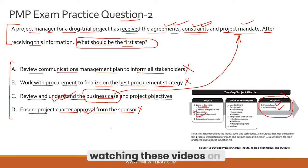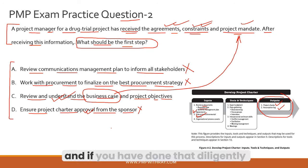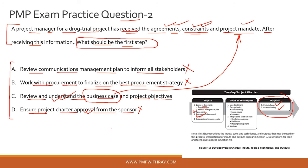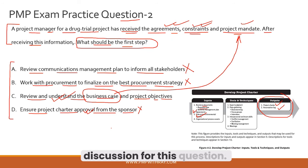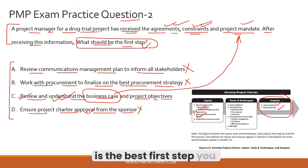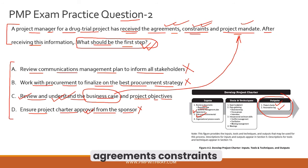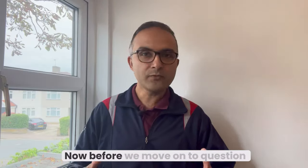Option D is basically jumping one step ahead. Be aware of situations where the PMP exam tries to trick you this way. The correct answer to this question is option C: review and understand the business case and project objectives. That is the best first step after receiving the agreements, constraints, and project mandate for your drug trial project.